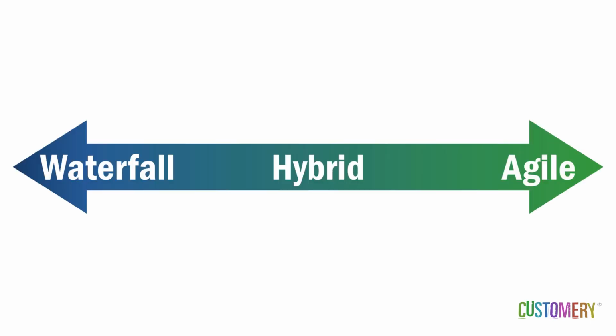Where I find a hybrid approach so challenging is that the underlying theories are at opposite ends of a continuum. Waterfall methodologies are a defined process because they expect no variation and lots of predictability. They gather all the requirements at the outset, perform the design up front, specify the tasks necessary to achieve the design, and then work hard to complete the tasks while resisting changes. And they don't need feedback loops because the instructions were already written and there's nothing new to learn.